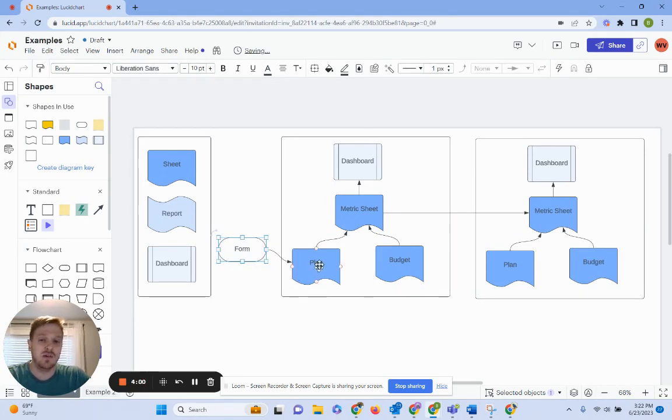Also, if you were to set this up to have a row copy or row move, if the destination is inside this folder, you need to make sure that it's rehooked up because it could get stuck to the original. Smartsheet does not copy the forms and does not copy the row copy and row move automations. You'd have to readdress those every time. But besides that, cell links and all the cross-sheet formulas you'd use are going to be duplicated with it.